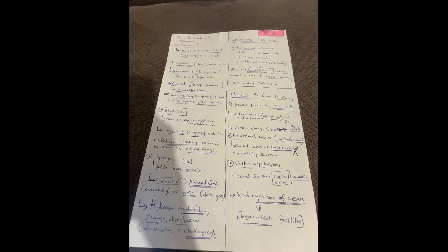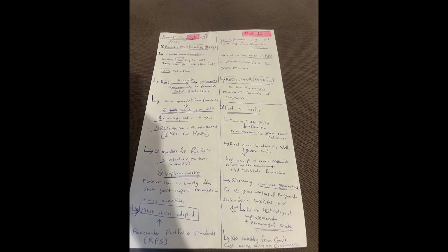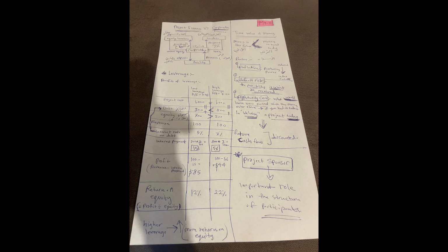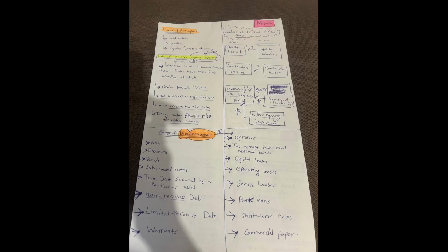But if the surety has to pay out, they expect full reimbursement from the contractor. It's not like insurance where the premium covers the potential loss. That's why a contractor's ability to get a performance bond is seen as a sign of their financial strength and track record. Got it. Okay, let's shift again to cost-benefit analysis, CBA, and those related financial metrics.